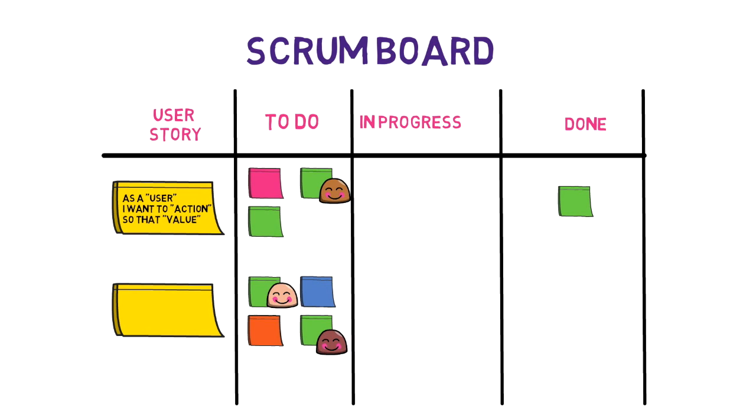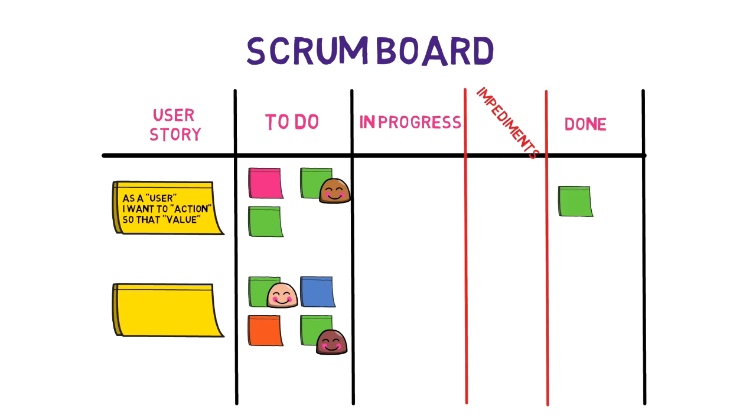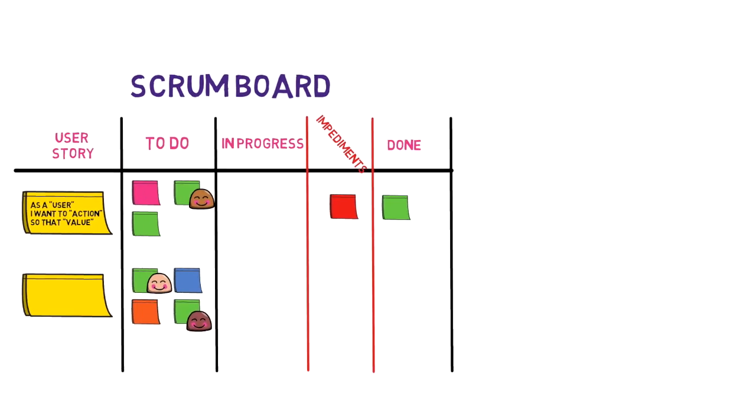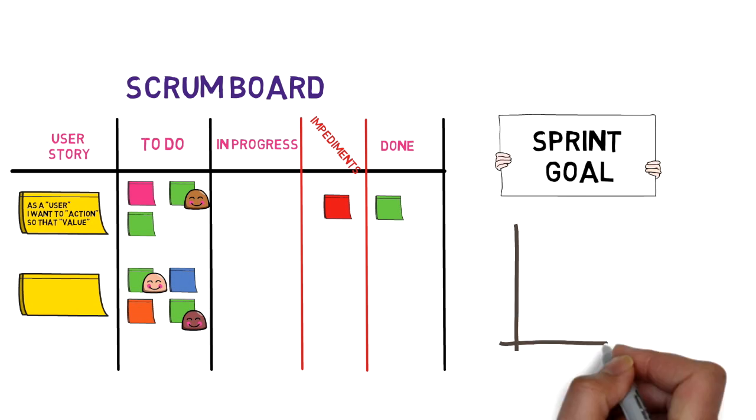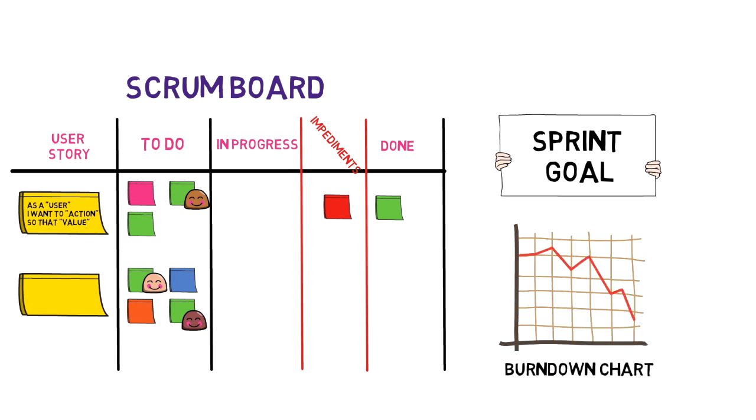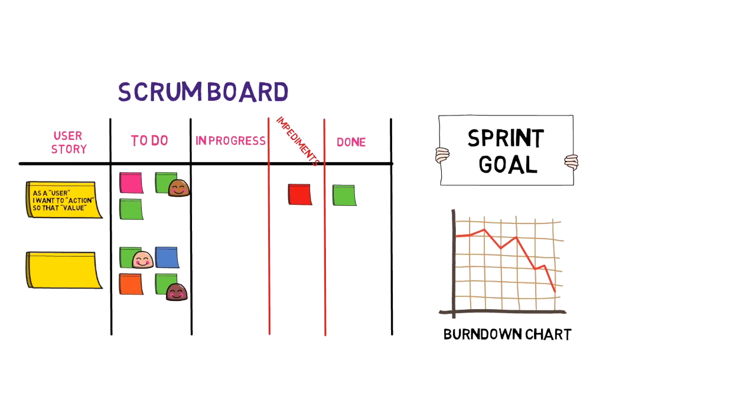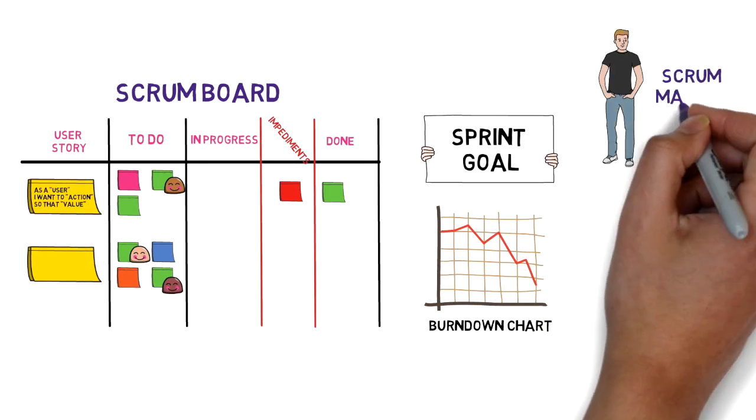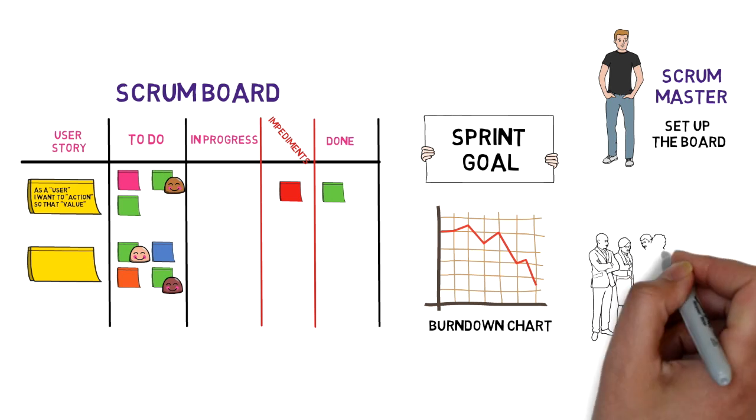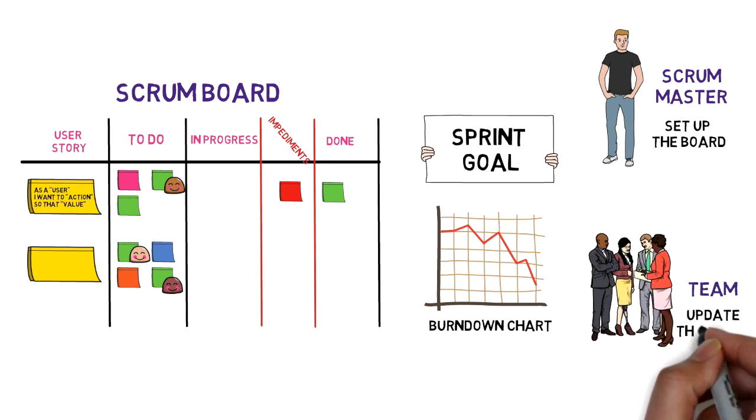More experienced Scrum teams might include a few extra details on their board, such as the impediments column when a task is blocked because of external challenges, sprint goal which is sometimes helpful to begin with to keep planning tightly focused, burn down charts which represents how quickly the team is working through a customer's user story. Many other elements can be added also to the board, and of course it depends on the needs of each team. Your scrum master might be the person in charge of setting up the board, but all team members should be able to access, manage, and update it.